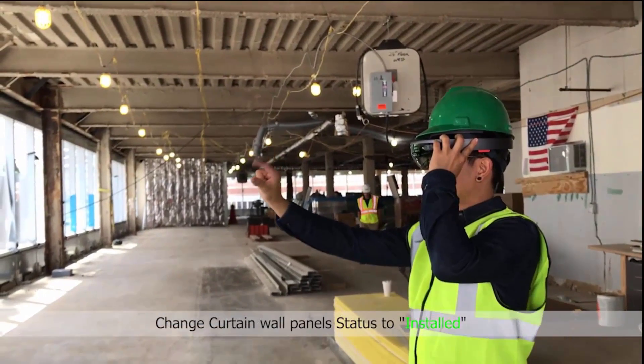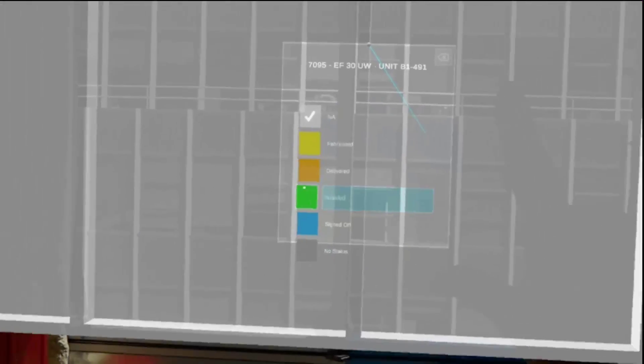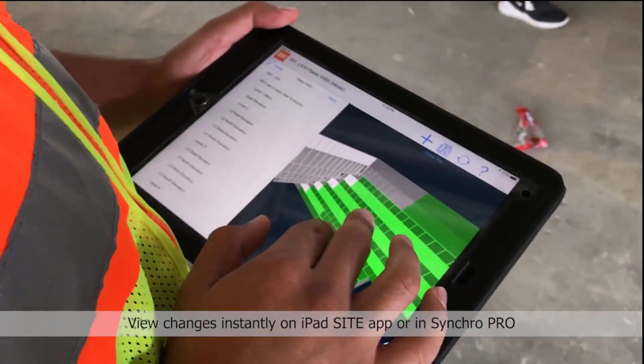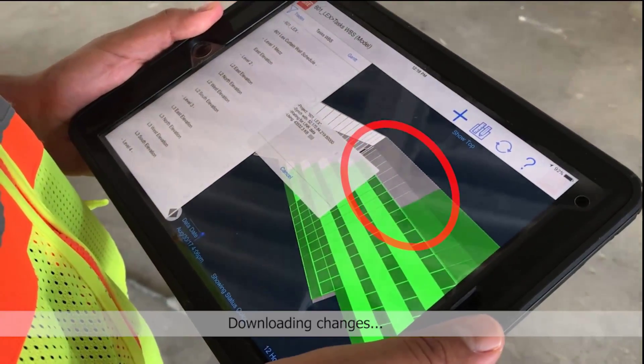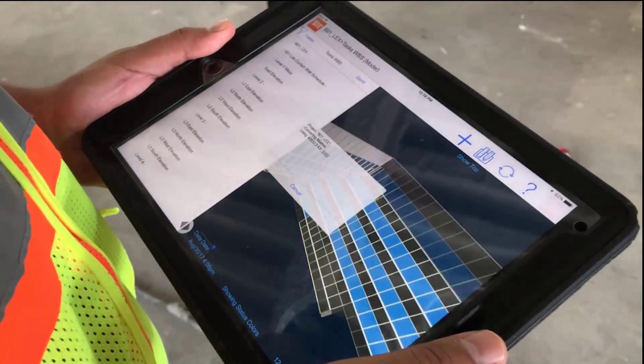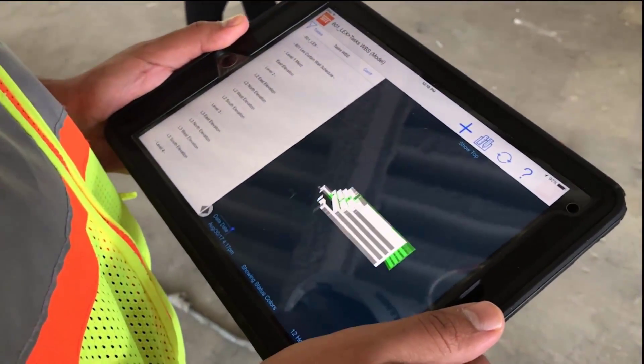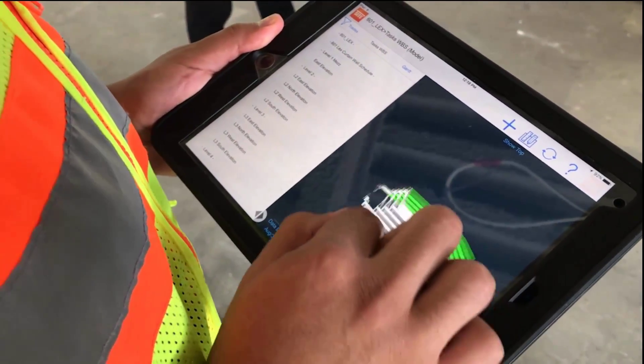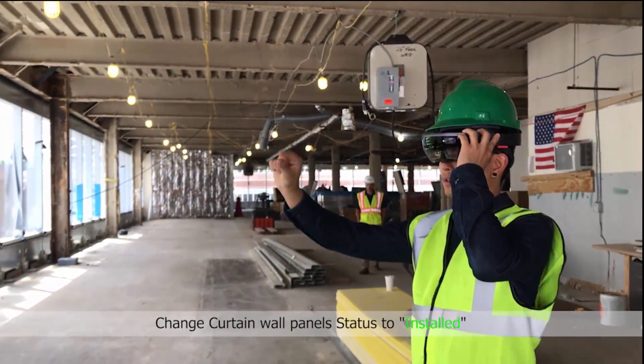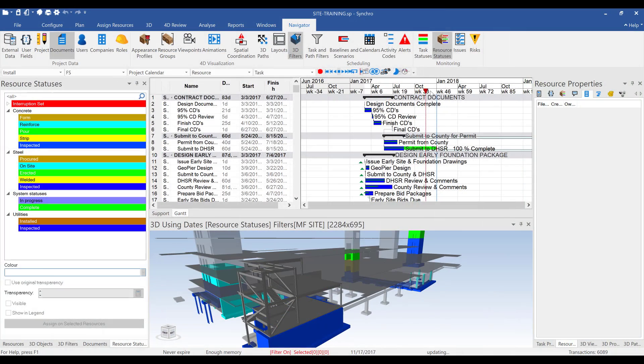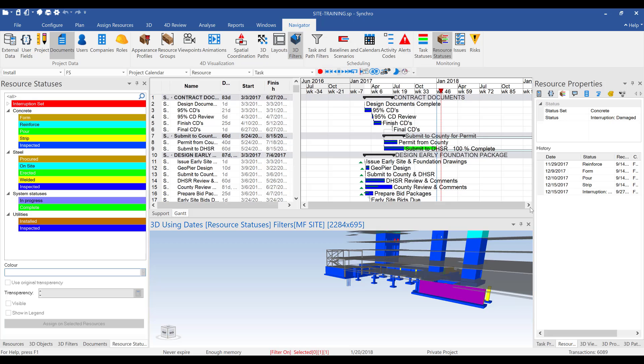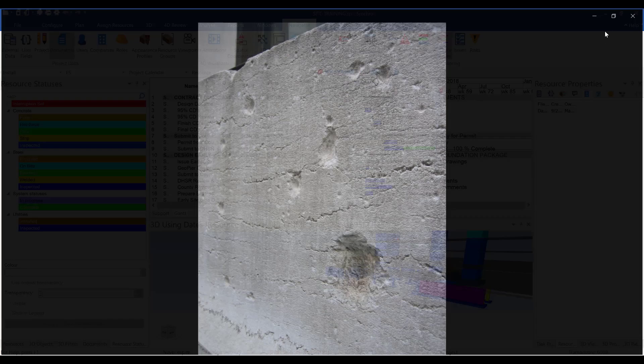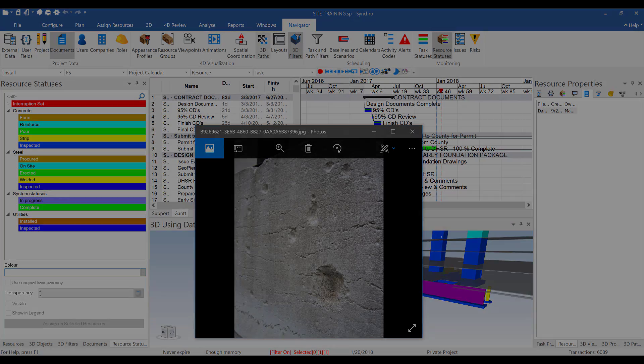But you don't want to just keep pushing information to the construction site, because once the project starts, it's even more important to be pulling information from the construction site. Synchro's mobile application, Synchro Site, makes this really easy. People using the app can status both tasks and resources directly from the field using an iPad or even in augmented reality using the Microsoft HoloLens. These statuses all go back into Pro and can be used to derive percent completes, signal other trades about potential constraints, attach photos from the site to the model, and most importantly, accurately show the real progress of the project.